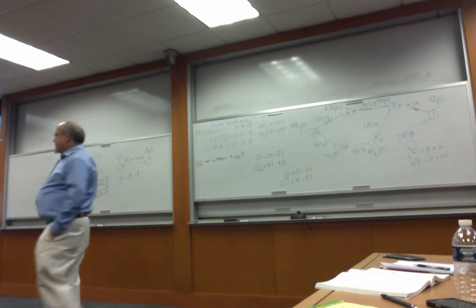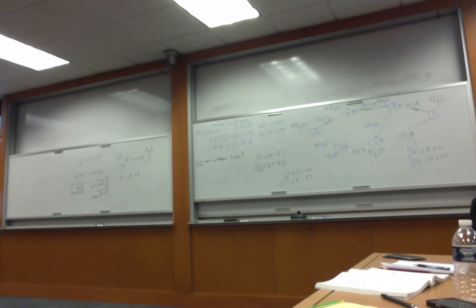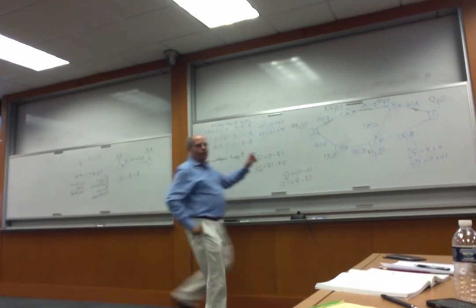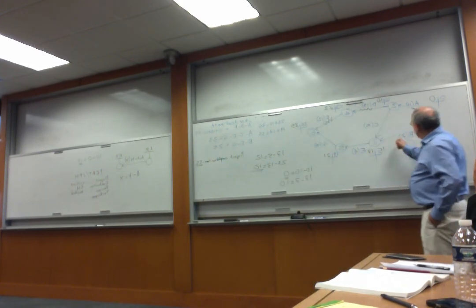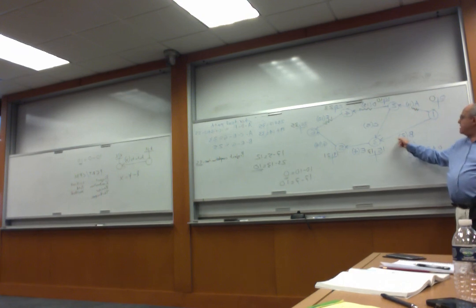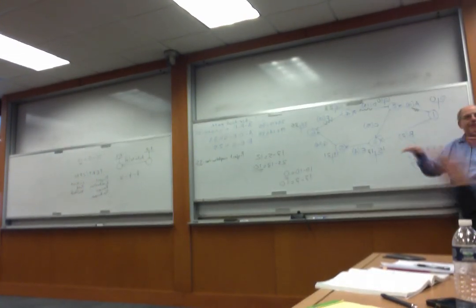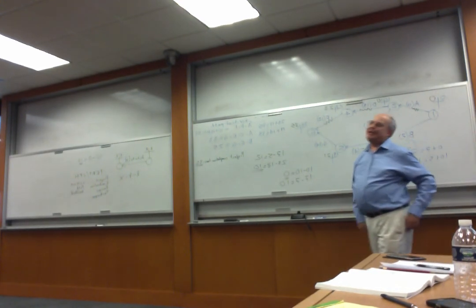When using Microsoft Project Manager or Primavera, does it ask you to know what the critical path is? No, it's going to find it out for you. And the other thing they do: what I showed you is static, I took a snapshot. So let me tell you in real life what happens. Let's assume things go wrong here, and automatically this instead of 7 becomes 15. As you go on, you enter the real values and it updates.